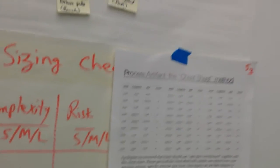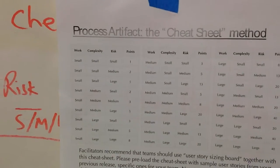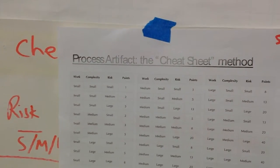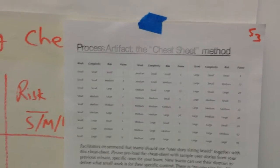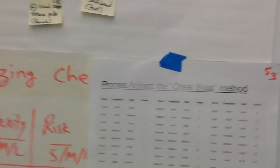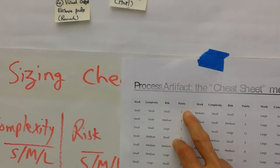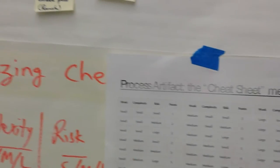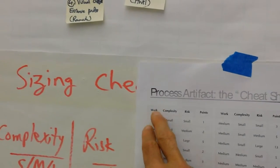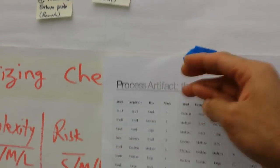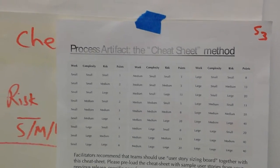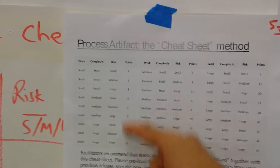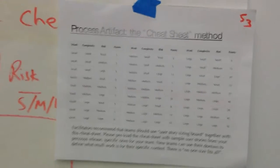All this stuff is on the cheat sheet that we have here, and we're going to use that to size the work as well as load it. Important point: there is no such thing as one point equals one day. That scaled agile framework normalization technique is completely useless—it has been proven useless beyond doubt. You've got to go back to the basics: find a baseline. This cheat sheet shows using the level of effort, complexity, and risk—there's a scale that experienced coaches have come up with that you can use as your baseline to size work.